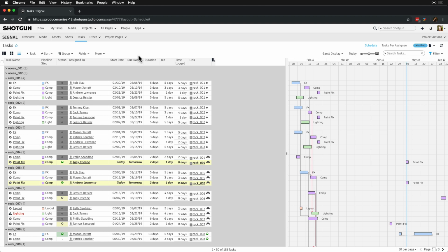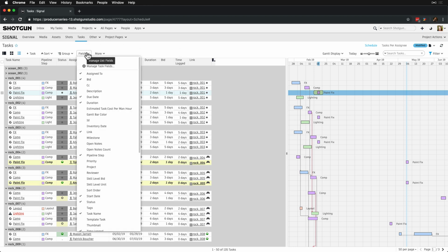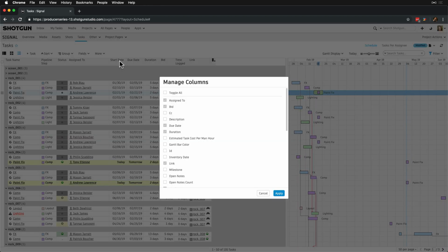If we are missing any or need to update a bid from a change order, we can add them in at any point by just editing the bid field on the task. To compare bids against time logged from our task page, we'll need a couple of things: the bid and the time logged fields. Let's then reveal the time logged % of bid and the time logged over under bid.